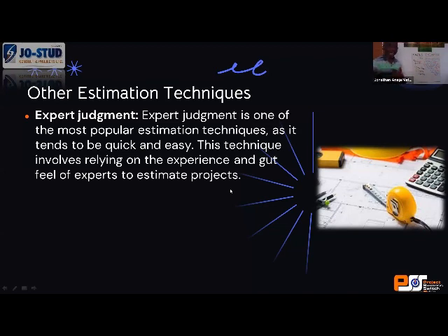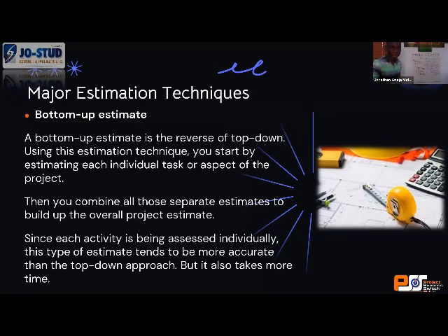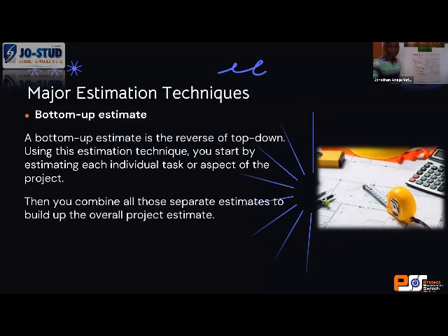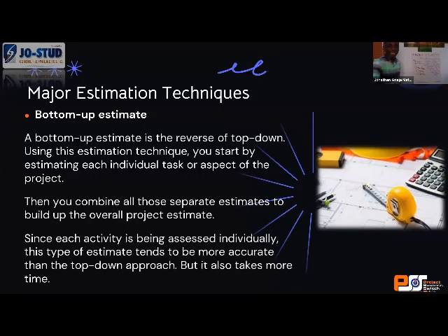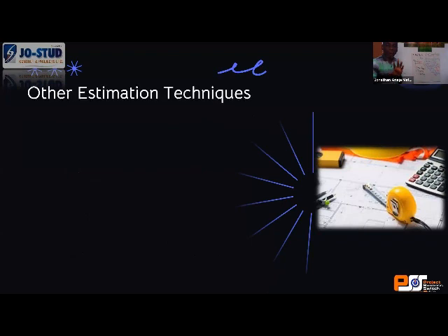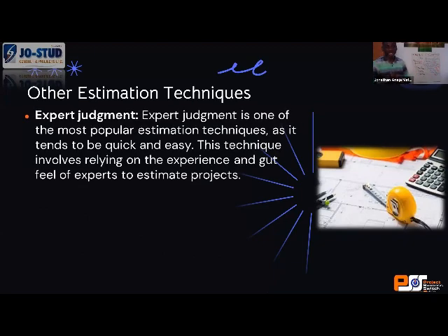So I was talking about expert judgment before you came in, Banke. What I said about expert judgment is you can use it in conjunction with other estimation techniques, because bottom up takes a lot of time. Let me go back my slide a bit. I say bottom up is the most accurate, but because individual tasks are being assessed, it takes more time. So for you to cut down on your time, you need some other estimation techniques that you mix with it.